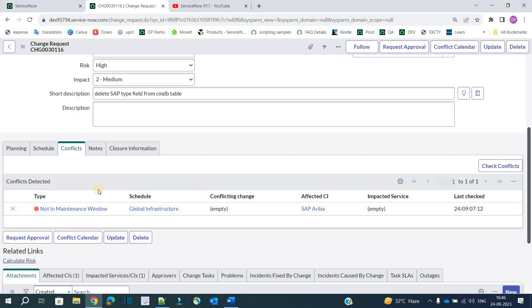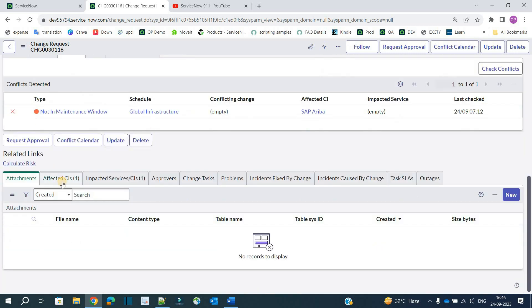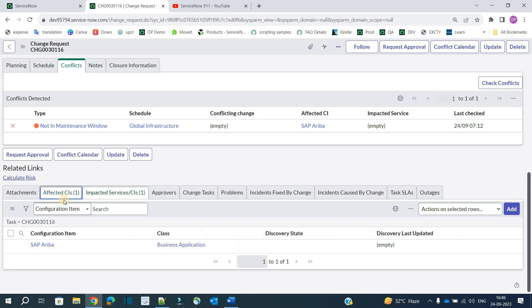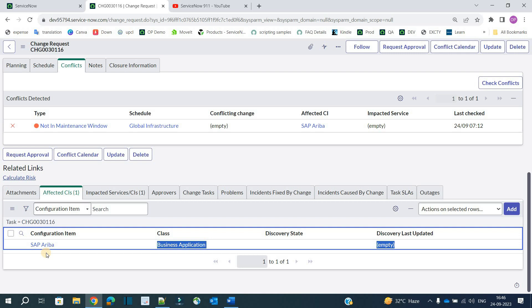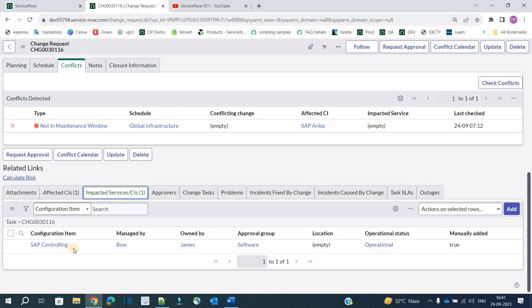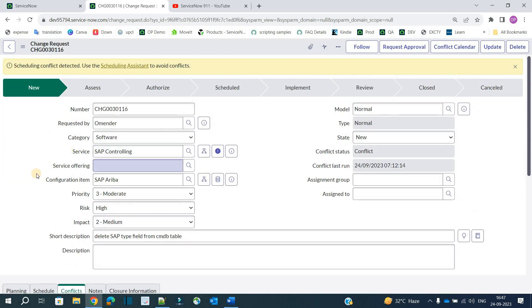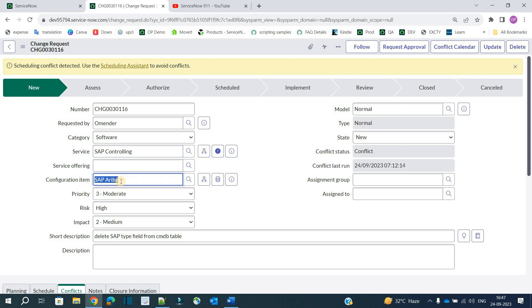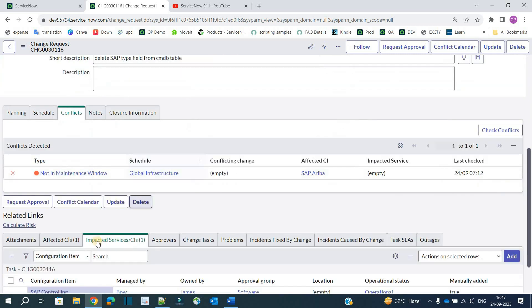Apart from conflicts, let me explain affected CI and impacted CI. In 'Affected CI' we have SAP Ariba — this is the configuration item where the change is being made. 'Impacted CI' refers to wherever there is an impact because of that change. Here the impacted CI is SAP Controlling — the service that may get impacted because we are making changes in SAP Ariba. So affected CI is where we make the change, and impacted CI is what gets affected by it.